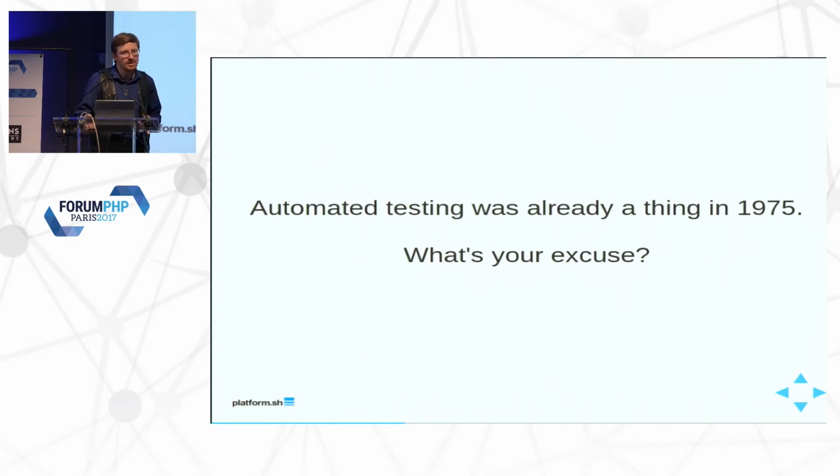And it's not that testing makes things take 3 times longer. It's fixing all the bugs that testing finds takes 3 times longer. You're going to fix them either way. You might as well fix them in the first place and factor that into your development.